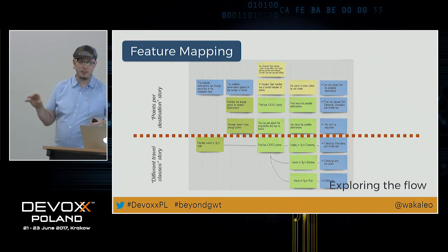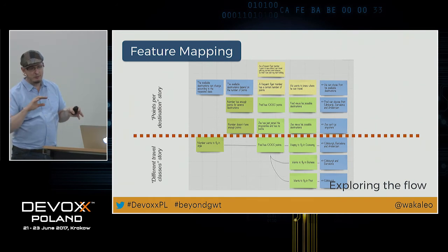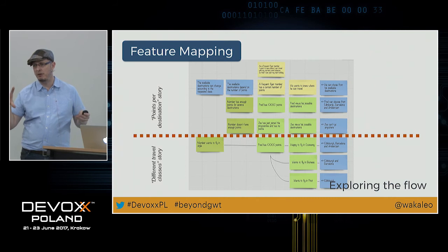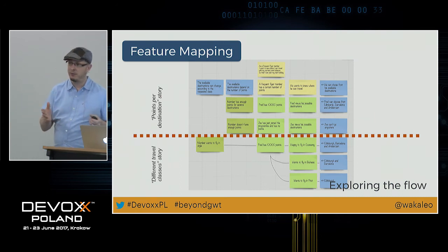And it's quite nice because we can actually split that out into several different stories that we could deliver for a feature. So if we find that the feature has lots and lots of rules, it might be too big to deliver in a single sprint. So we could split it out by rule.